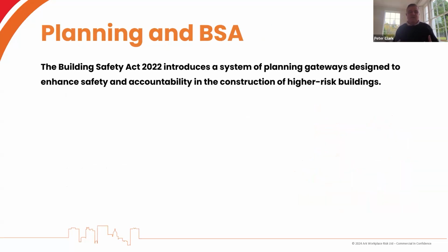One of those I've touched on, and I won't get into too much detail, is planning in the Building Safety Act. And I think if you know, you know. So if you're involved with planning, you'll understand gateways 1, 2, and 3. You'll understand that the Building Safety Regulator has taken over a role that would previously have been done by local authorities, for example, and now they are approving planning applications through gateways. These are designed, obviously, to enhance safety. Again, everything is about improvement and accountability in the construction of high-risk buildings.